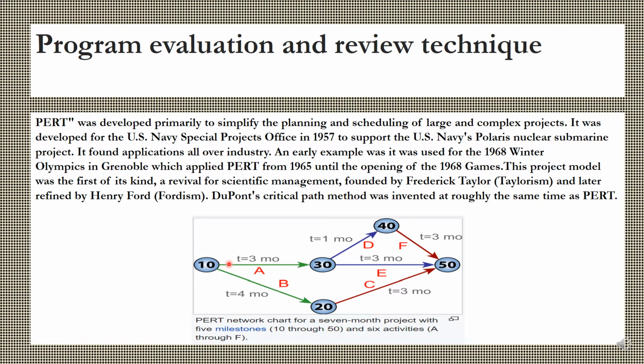Three time estimates are made: optimistic time, which shows the minimum time required if everything goes exceptionally well; pessimistic time, showing the maximum time of the activity; and the most probable time, which lies in between the two. And the last step is to determine the critical path.